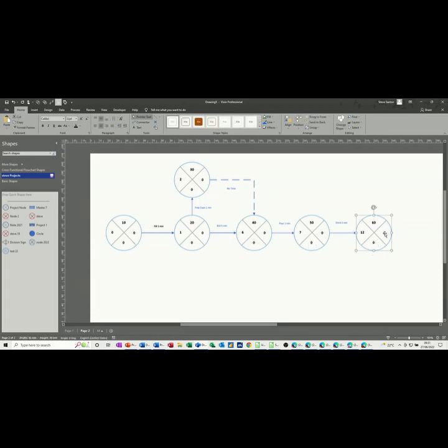So you start off at the end, that's 12 minutes, and then you take off this duration here, so that's going to be 7, and then you've got to take these two from each other, so 7 from 7 is 0, so you're coming back again, that's 1 minute, so that's going to be 6 from 6 is 0, and then we've got this little arrow here where there's no time but it's still 6, so we're going back